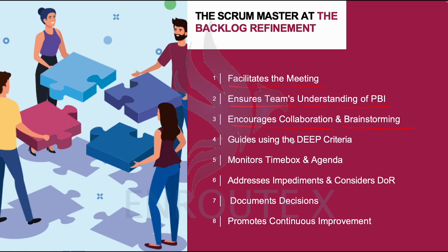In the last module, module 2, when we discussed backlog refinement, we also discussed the DEEP criteria. DEEP standing for Detailed appropriately, Emergent, Estimated, and Prioritized. So the Scrum Master is also guiding the team to ensure that each story complies with the DEEP criteria.